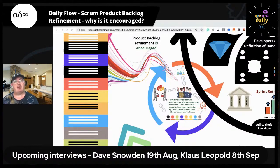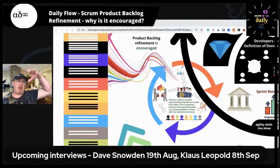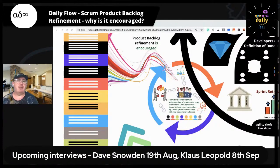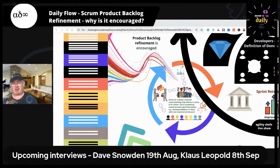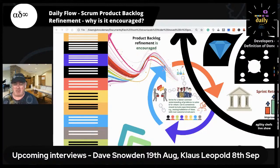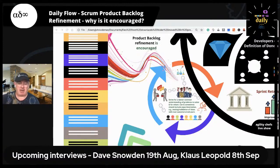Product backlog refinement is about getting a common understanding. The Scrum Guide isn't prescriptive about what happens from there. I would hope we'd almost be treating it like Pac-Man — chewing down through the backlog and breaking items down so they're small enough to fit within a sprint, for the next two to three sprints. We don't want to fully break down all of the product backlog, because some items at the bottom might never be delivered. I had one team in Ireland who did that — a fully broken-down backlog — and I thought it was so wasteful.